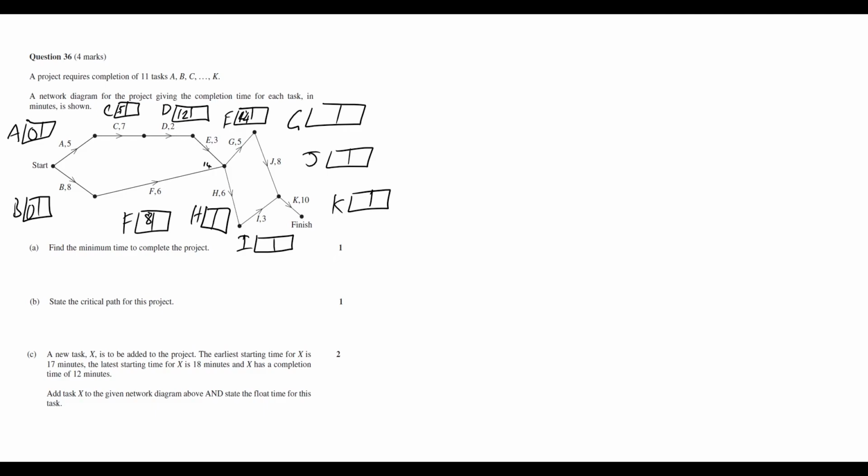So that actually takes us, I believe, 17 to get there. So that means that for us to start task G, we need to actually wait 17, I believe this is minutes. Okay, and so similarly for H, the earliest we can start that is going to be 17.